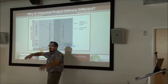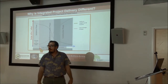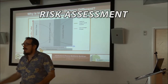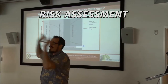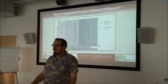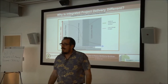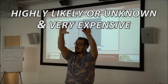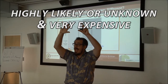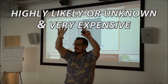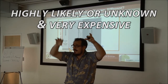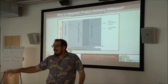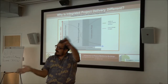One of the things we do in a relational contract is we start at the beginning with a risk assessment. We form a chart and everybody brainstorms anything possible that could go wrong. Then we rate them on likelihood and cost. The stuff that's highly likely or unknown and very expensive are real risks. The ones that are very unlikely and not too expensive — really, they're not that big a deal. Everything in the middle is in that continuum.